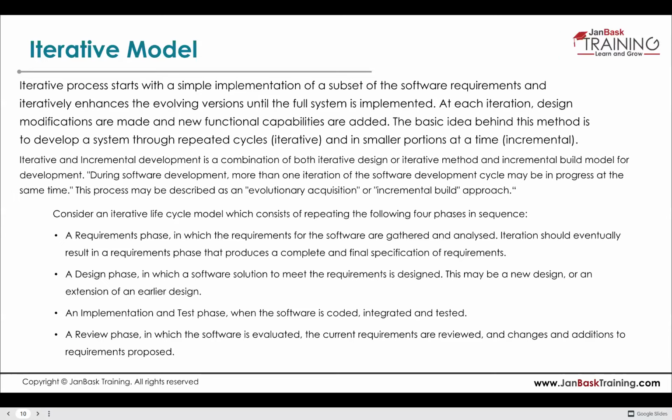So what is the advantage? What do you understand by now? It is not very rigid. It's very flexible, and the changes can be incorporated early. And another thing is, in each iteration, suppose each iteration is of 2 weeks. In every 2 weeks you are coming up with some of the requirements, you are doing the design for that requirement, you are making the changes, you are doing the testing, you are demoing it to the customer.